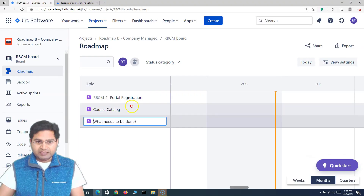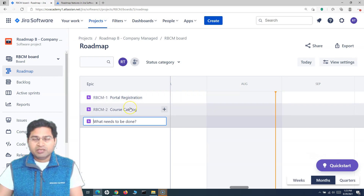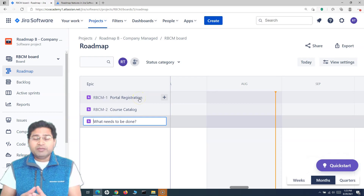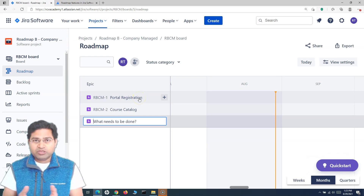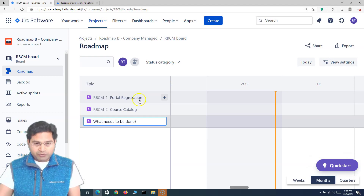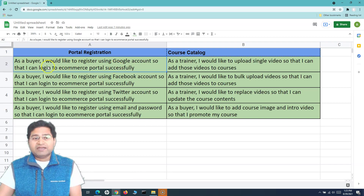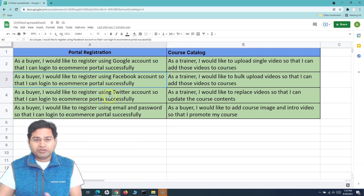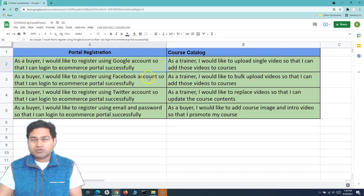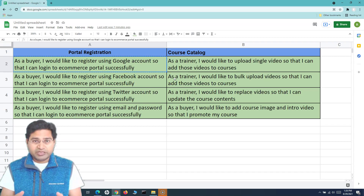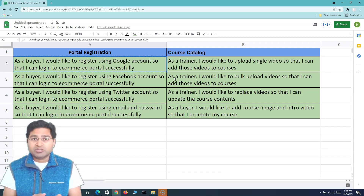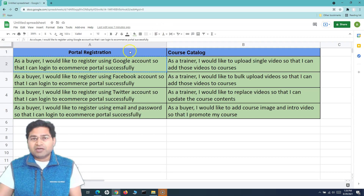Course Catalog is the second epic. These are two big pieces of work that need to be completed as part of this project. Below these big pieces of work there will be stories. For example: 'As a buyer I would like to register using a Google account so that I can log into the ecommerce portal successfully' — similarly with Facebook and Twitter. This sample data illustrates how you populate information when working in an actual project using the roadmap.